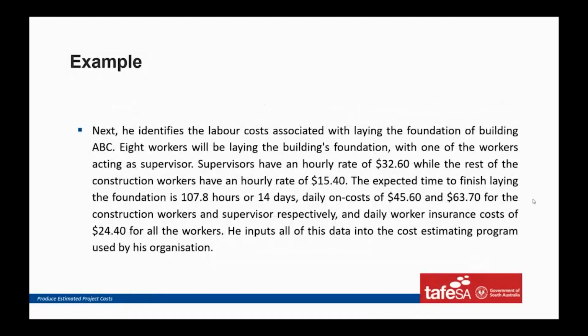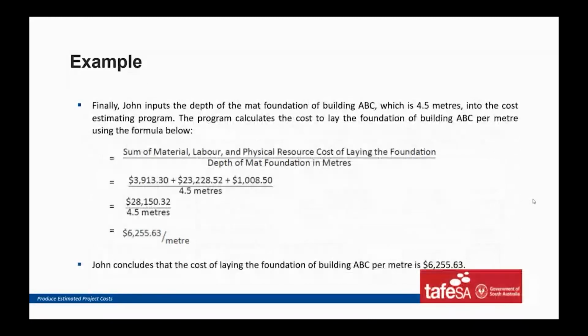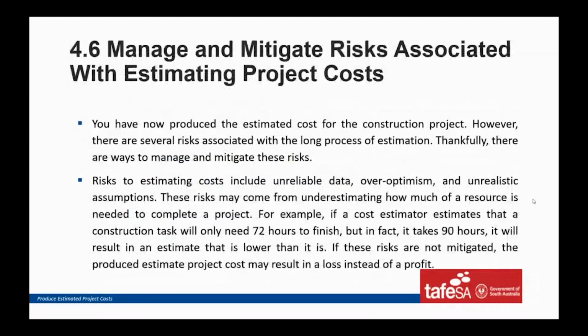Okay, a couple more samples. Nothing too difficult. Ours is a little bit more sophisticated than that, though certainly not top of the tree. The fact is, what we're doing here is teaching you how to do that. And you'll find that the number one thing I'm actually teaching you is the building process. Because if you understand the building process, you then understand how long that process is going to take. If you don't know the building process, there's no way in hell that you're going to get a price that is accurate. So this is a real key.